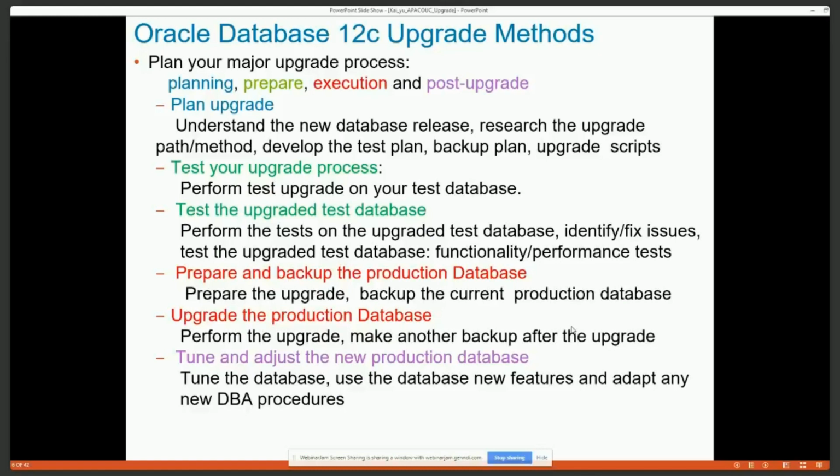Then, once you plan that, you're going to test your upgrade. Hopefully you can test your upgrade on your test database, so you try your upgrade before production and risk minimum. You also need all the test steps, so by trying it on some small development database, you also can test functionality on the test database. It's not just the upgrade. You need to test the result.